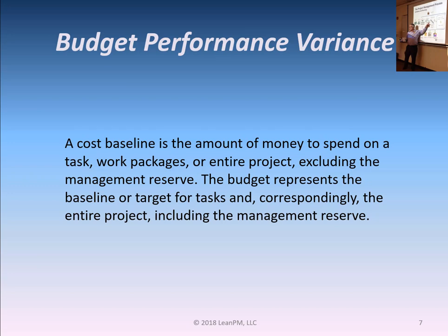Rarely does a project proceed according to plan. Critical and non-critical tasks sometimes exceed their cost baselines. A cost baseline is the amount of money to spend on a task, work packages, or executing an entire project, excluding the management reserve. The management reserve represents the money set aside for unexpected risks, should they occur.